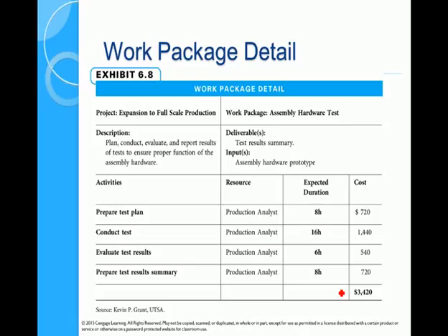How do we know that this work package has been completed? What is it contributing to? We then have a series of activities. We assign a resource, which is the sorts of things that you've done in the labs this week. And finally, we've got estimated durations, which we use as a cost.